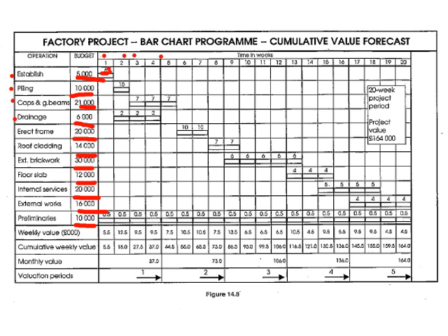And then your piling is also 10,000, and you have a week for that. Caps on your piling will run over 3 weeks, so it's 21 divided by the 3. Your drainage will start early, and it will also run over 3 weeks, and so forth. You can see they made it very simple. They just divided it by the amount of time that you actually spent on it.